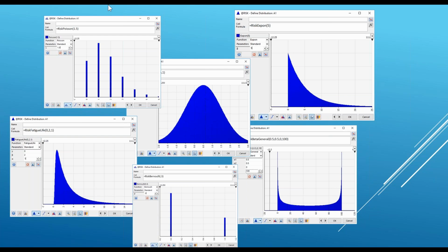So we can actually use this to our advantage when we go through an example model where there's a chance that a competitor might enter the field. If a competitor might enter the field, we can plug in a Bernoulli function, and that Bernoulli function can represent the chance. So if there's a 30% chance, then only 30% of the time of our simulations will we actually put a 1 in that cell. That may trigger different values being populated throughout the cell, because we're in Excel. So the Bernoulli function is an on-off switch.